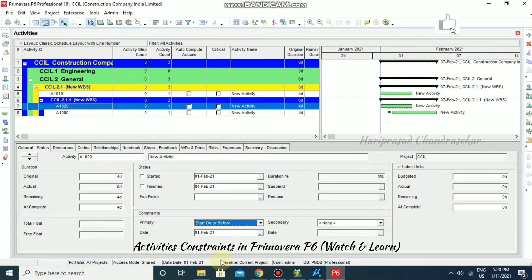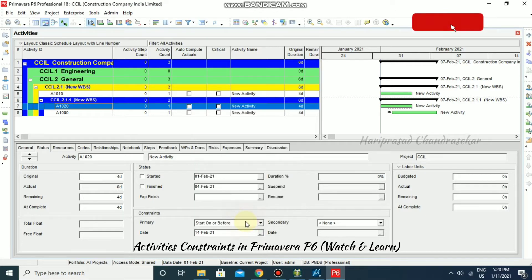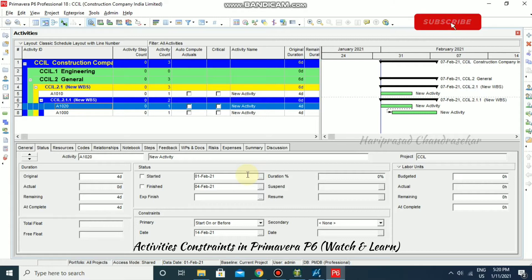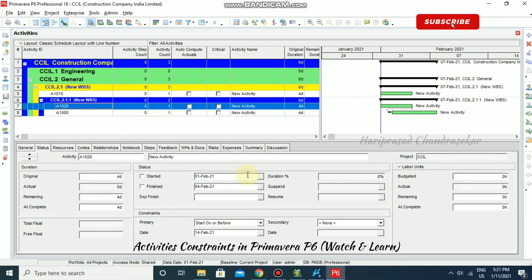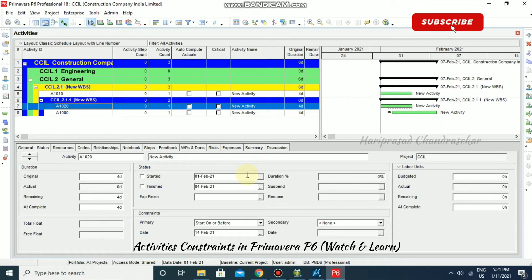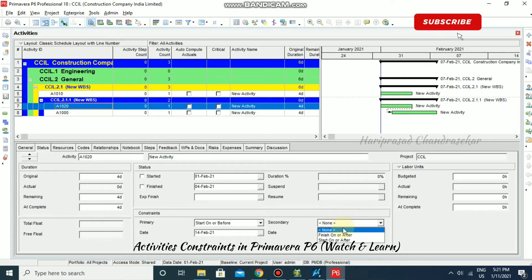For start on or before, you can put any date by selecting it. It's a restriction you impose on an activity that limits the latest date it can start. For example, it can start on 14th Feb or before. When calculating a schedule, the start on or before constraint is used in the backward pass only. If the calculated late start date is later than the imposed date, this constraint may decrease total float and only affects late dates. We can also put secondary constraints based on that to schedule our projects.